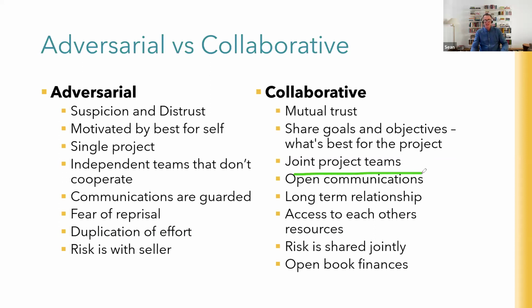You'll get joint project teams who come together to establish their own cultural identity and their own ways of working, because they actually join together. It doesn't become buyer and seller, it's the project team. Open communications, that's what mutual trust is built upon. It's usually done for more than one project, so you establish that long-term relationship.